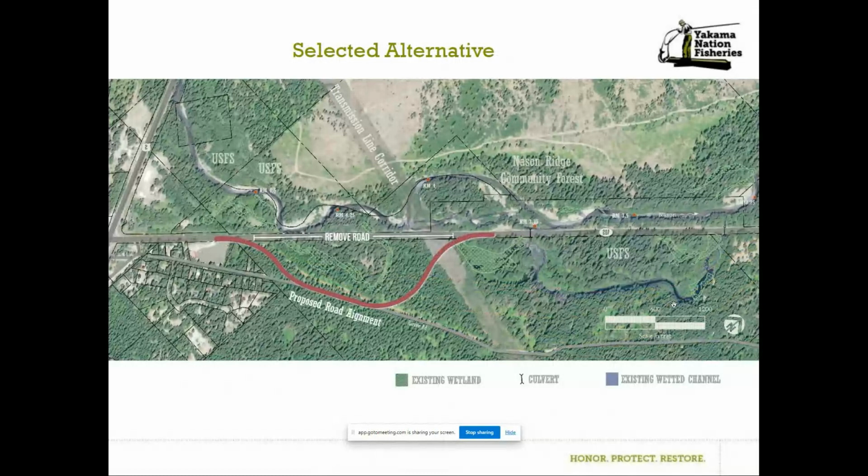But you have wetlands down at this lower section, and you would have wetland impacts. For those of you that are familiar with working with Department of Ecology and having wetland impacts, it's a struggle. Technically, you've got to be able to show that you're going to create more than you're going to impact if you're changing those.